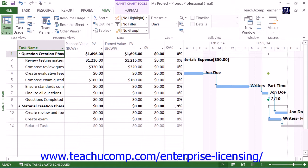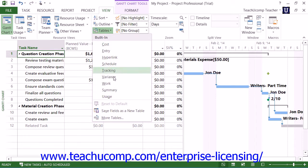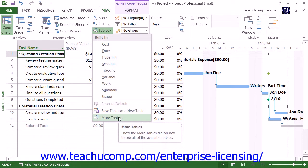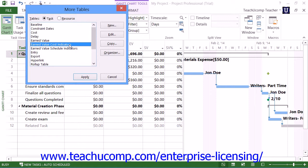You can also view the Earned Value Cost Indicators for your project file in the table view of the Gantt chart. You can switch to this view by clicking the Tables button in the Data button group on the View tab in the ribbon, and then choosing the More Tables command from the drop-down menu. In the More Tables dialog box, select the Earned Value Cost Indicators choice and click the Apply button to display the values in the Gantt chart view.